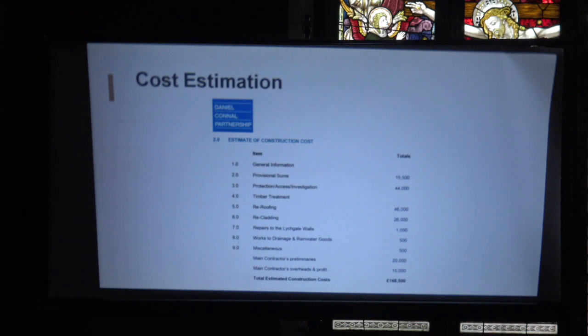The shingles will cost nearly £20,000 to replace. But this gives us an opportunity as well, because we can do things like sponsor a shingle. There's probably about, I don't know exactly, we'll have to get an estimate of the number of shingles, but I think it'll be about 4,000 or 5,000 shingles. So if we get people to buy a shingle for £5 or something, we can raise £25,000 that way, or put it on a Just Giving type of page. But these are the things we're going to have to think about doing, as well as the grants that I'll come on to in a minute.